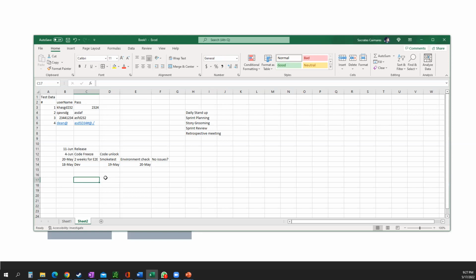Most large companies do releases where the smallest time frame will be a month. The longest in an agile team will be 3 months, a quarter. So you do your PI planning.